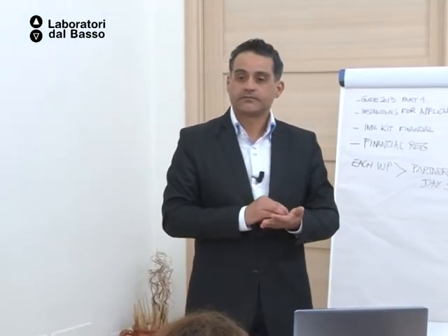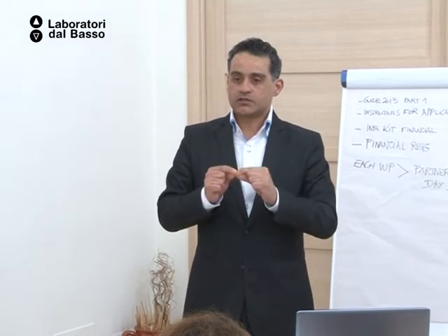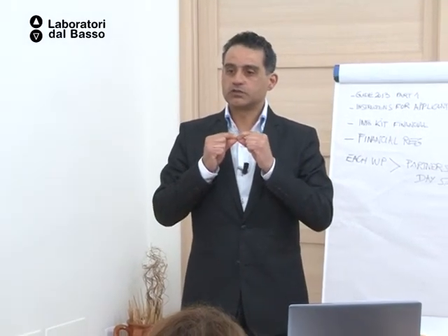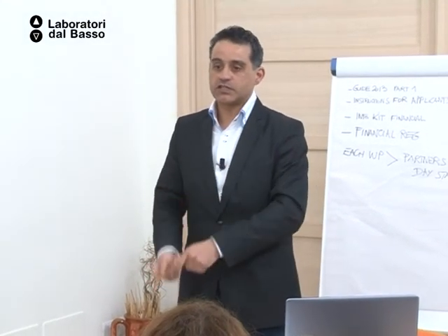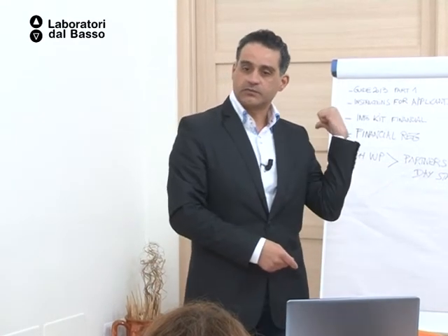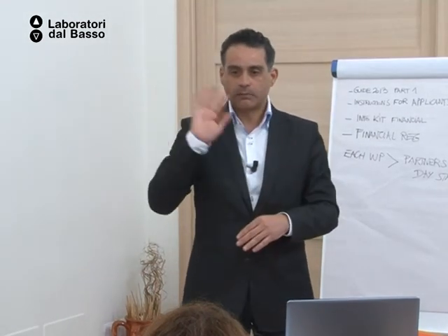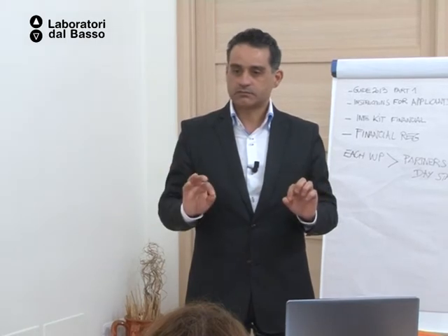The eligible costs also are costs that are foreseen. You've been considering this cost in your project. It's not something you will invent in the middle of the project. Oh, by the way, I have to make a trip somewhere. No, they are foreseen. If a cost you are doing during the project is not in the table at the time you applied, bye-bye, it's not eligible.